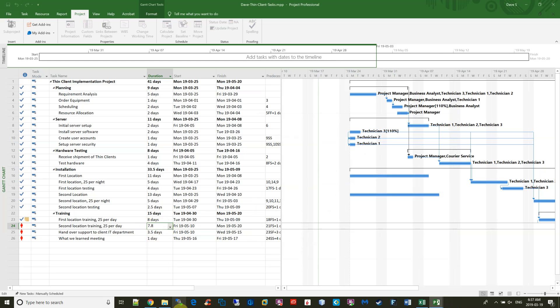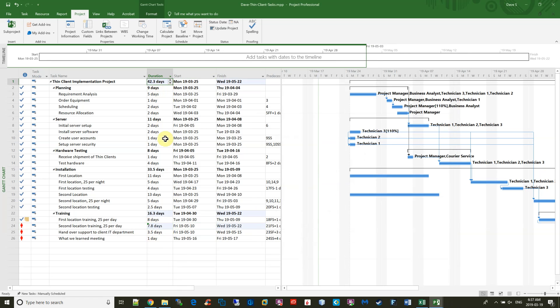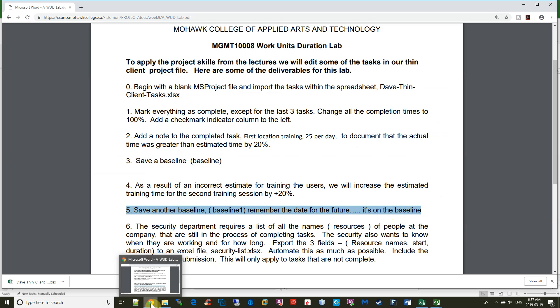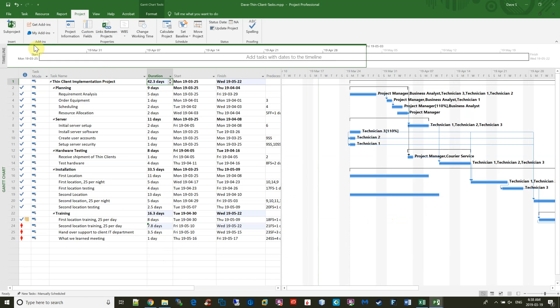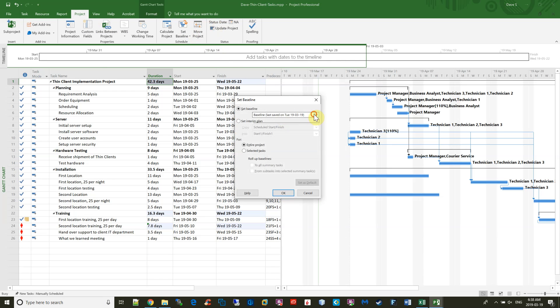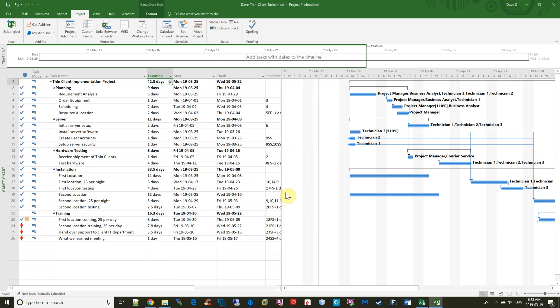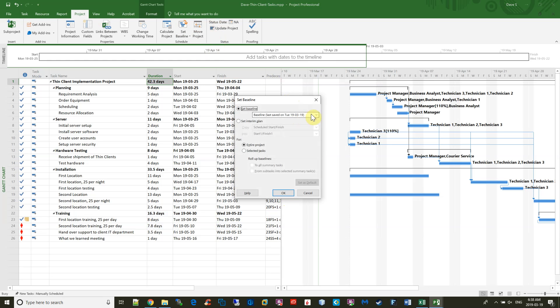And it changes the total length of the project, but that's okay. Next, we have to save another baseline. So we go back to Project, Set Baseline, and we already have this baseline, so we have to go to Baseline 1 and set that. Now, if you take a look, you've got two baselines.